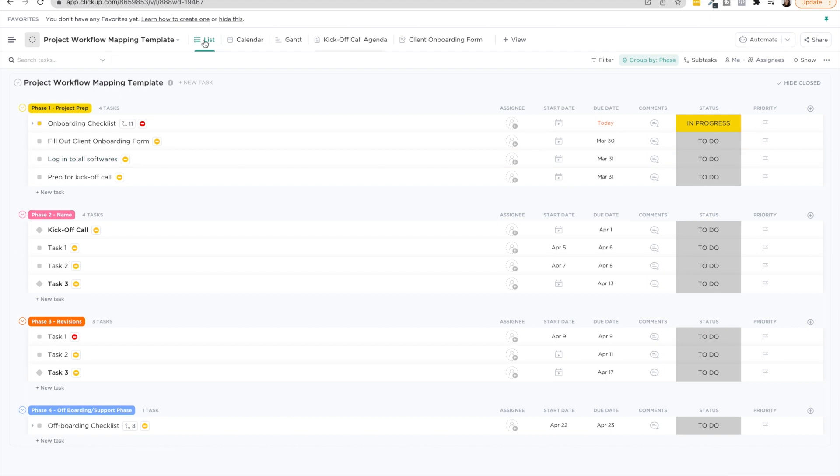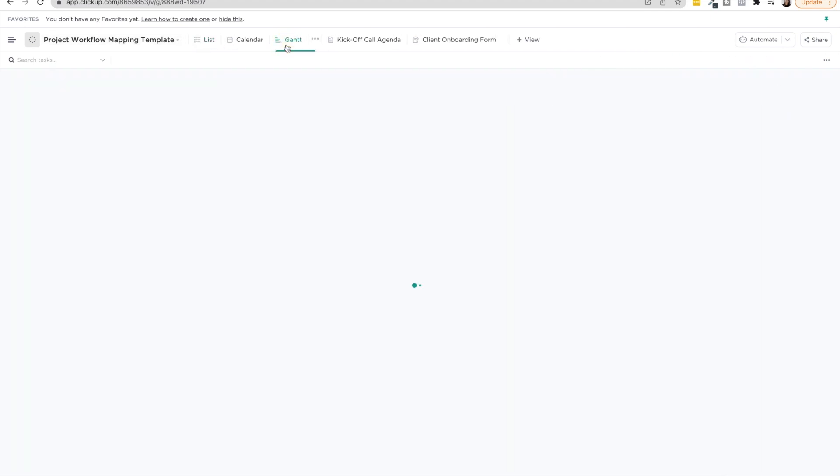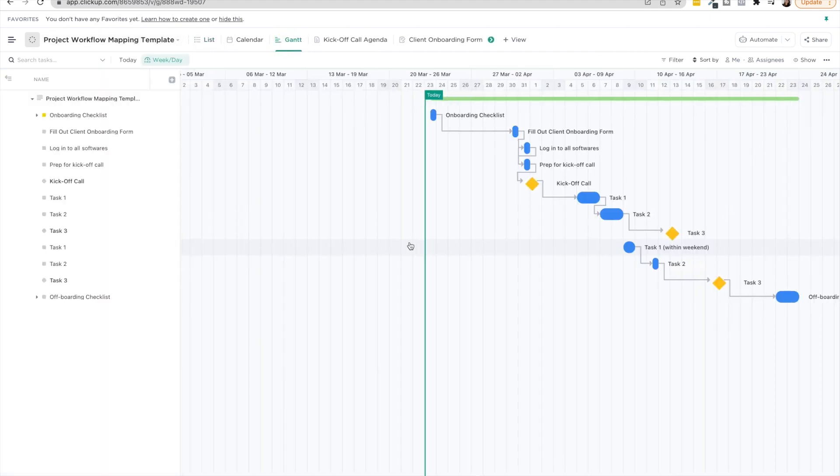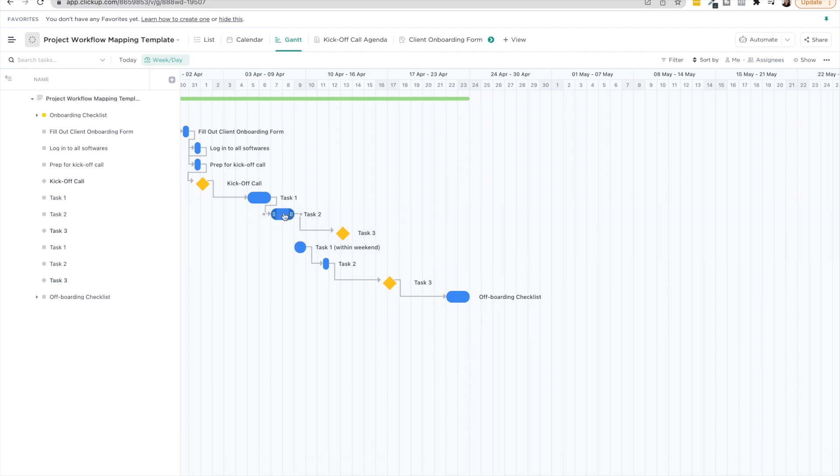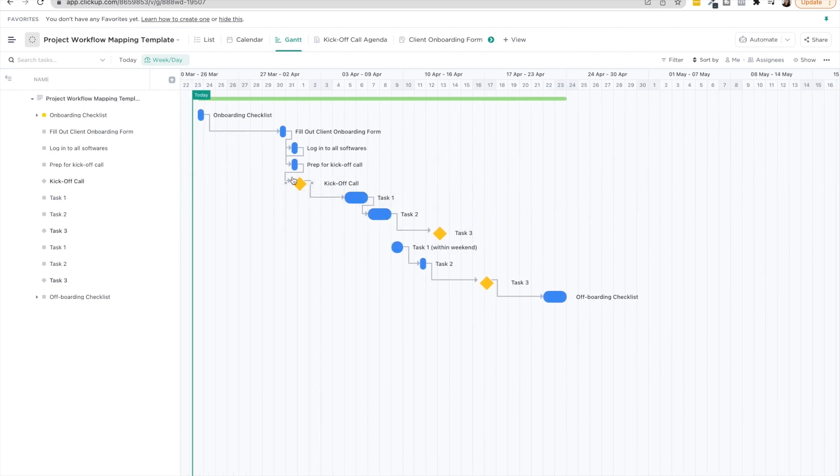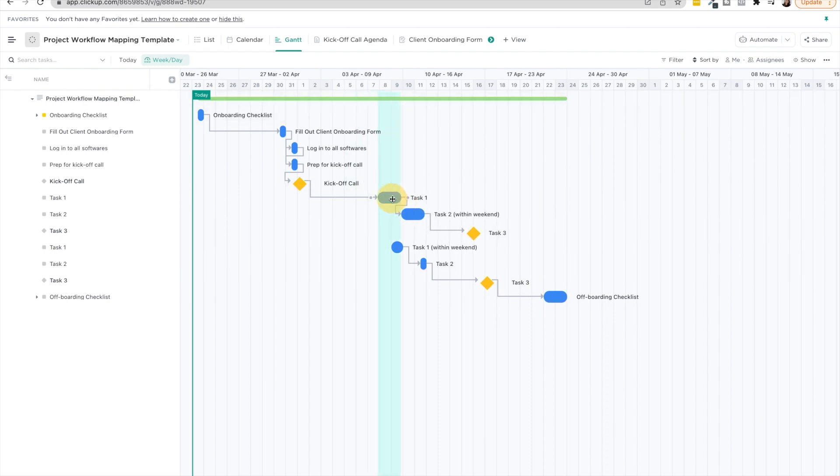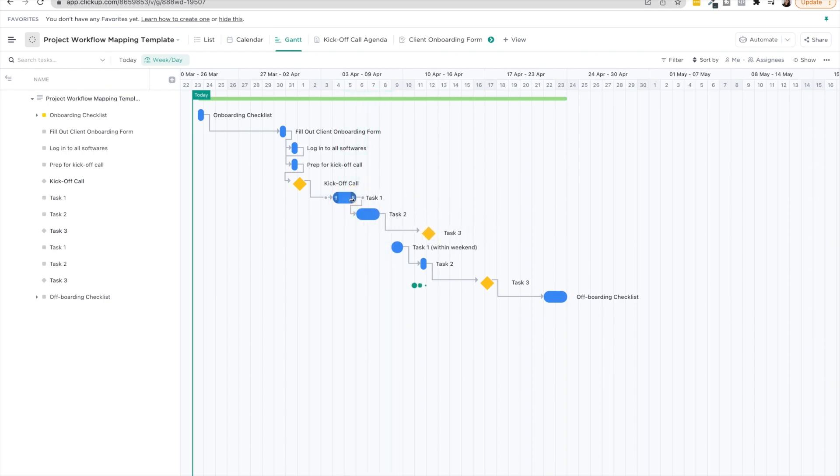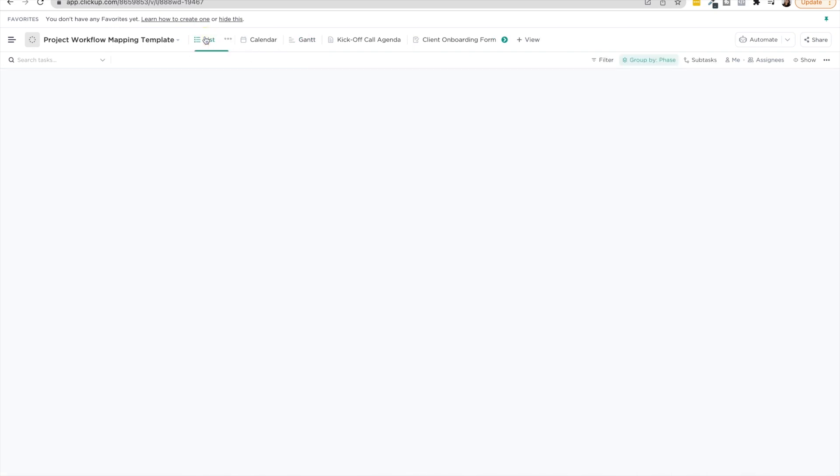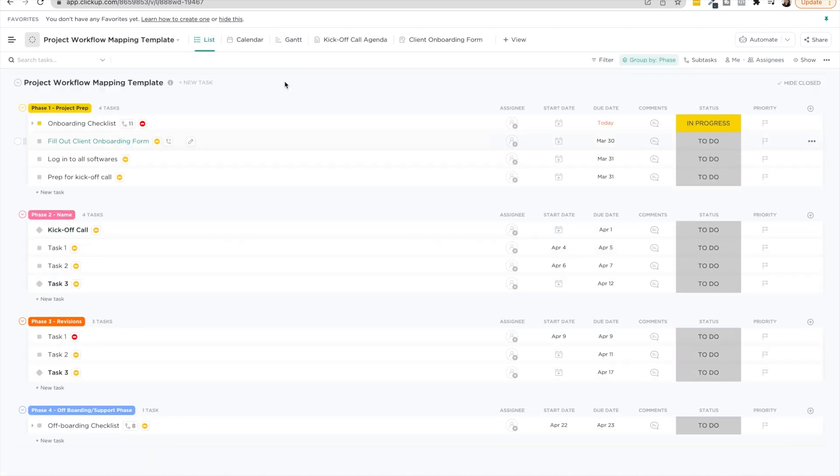So we have this list view. You can also see Gantt where you can visually see the dependencies. So task two can't be done unless task one is done and the kickoff call is done prior, et cetera. So you can also remap these two in this Gantt view, which is really cool as well. Seeing how if one thing is getting delayed, it's going to delay everything attached to it.